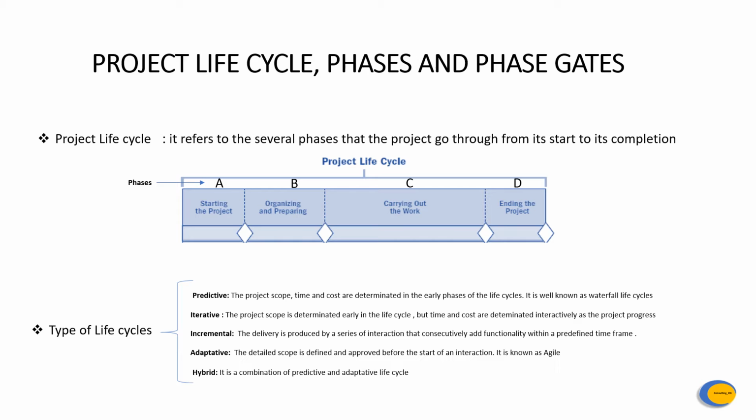Another salient point is the phase gate, which is a review at the end of the phase in which a decision is made to continue to the next phase, to continue with modification, or to end the project or program.